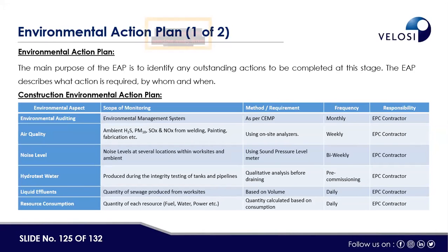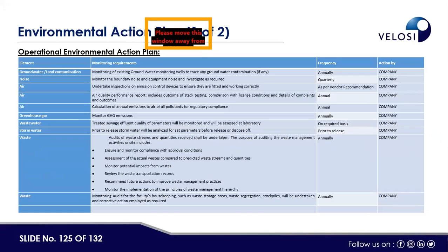Hydrotest water produced during the integrity testing of tanks and pipelines. Qualitative analysis before draining, during pre-commissioning, and the responsible party is the EPC contractor. Liquid effluent and resource consumption.